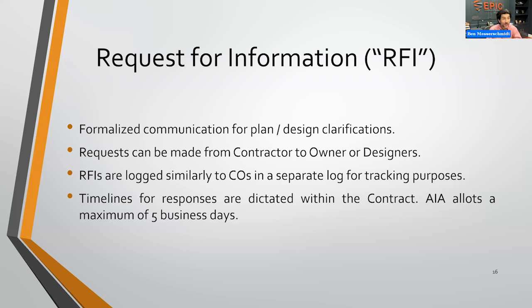Believe it or not, designers, and when you have multiple designers, you may have some conflict there. I've seen things built at wrong elevations before, and this is why you have the RFI process, to get that clarity prior to building. On these projects, when you have a qualified general contractor, they're already doing a plan review even before they get the job, or right when they get the job, to see, okay, what questions do I have now? Some of these RFIs that they send over might even yield a change order if the design is silent on the directive as to what to do, within reason.